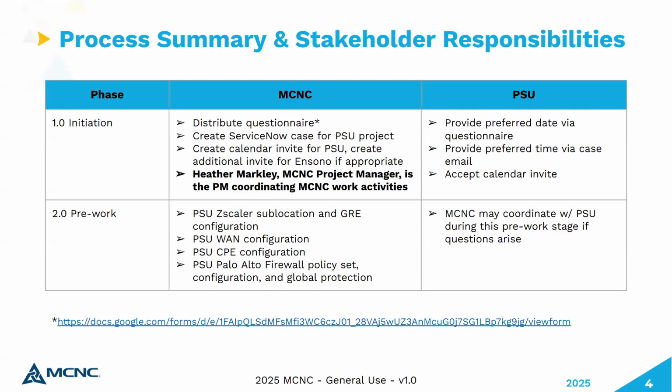Sure. So I'd say about a week before the maintenance window, you all should see some additional objects be added to your firewall. These are going to be some loopback addressing or loopback interfaces, some additional security policy, things like that. And that's just us getting ready for the maintenance window, trying to get as much in the firewall that's kind of inert and not doing anything as we can. So none of that new configuration will be in use until the maintenance window actually happens. But don't be alarmed if you see some new things show up about a week before your maintenance window.